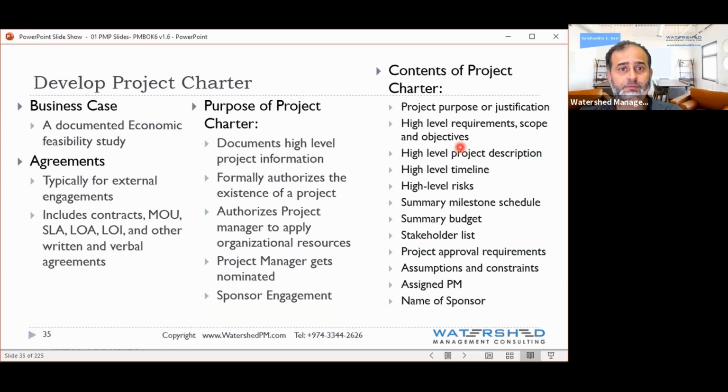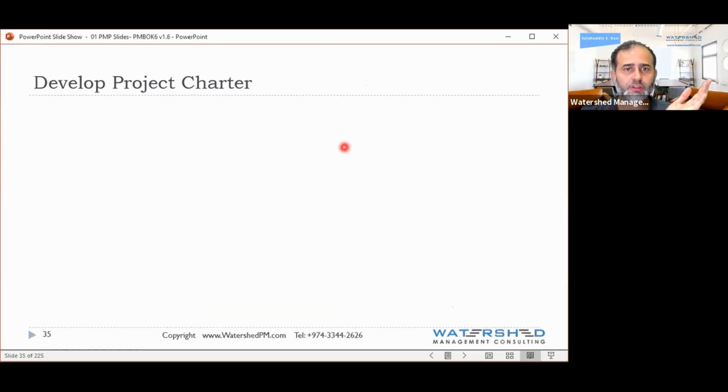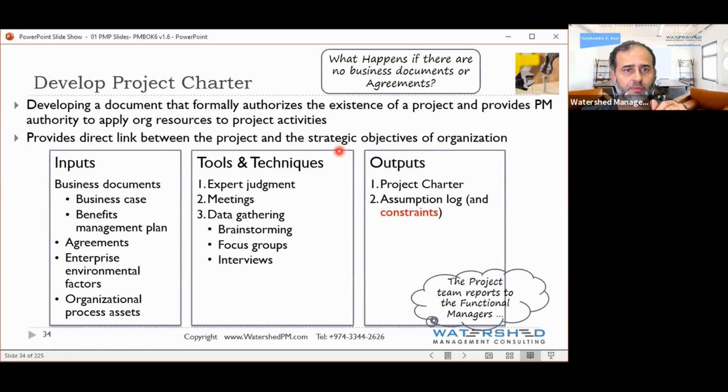It will. Make your life easy. Go find that contract, or bring the team who knows the contract, sit with them and ask them, or you read it. Okay, tell me the high level scope. You write it down. Okay, tell me the timeline. Either you read or you ask the contract.